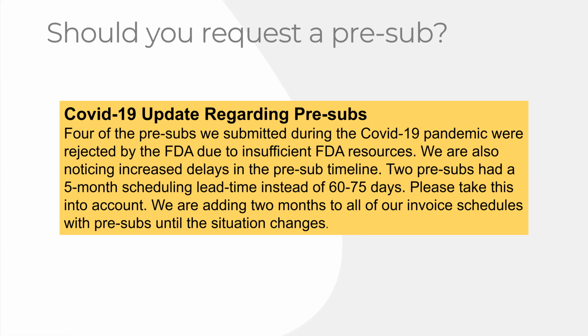Okay. So they invite me to the design freeze, and the first thing I see in the Gantt chart is they're going to complete ordering a mold and having it delivered for molding plastic parts in 4 weeks. And this particular part was a mold for a housing for a multi-parameter monitor. I'm like, that's 12 weeks. They're like, what do you mean? That takes 12 weeks. I mean, if they dropped everything and the whole entire shop worked on it, maybe they could do it in 4 weeks. But you're never going to find somebody that can actually deliver that mold finished and working in 4 weeks. It's 12 weeks. The actual time ended up being more like 14 weeks in reality. But they had said, oh, this is going to be done in 4 weeks.